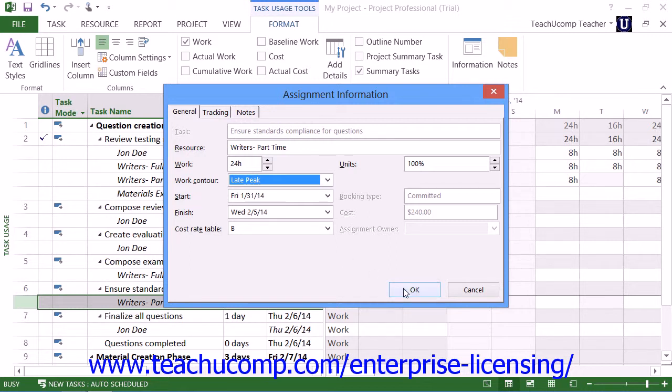Finally, click the OK button to apply the selected work contour to the work assignment.